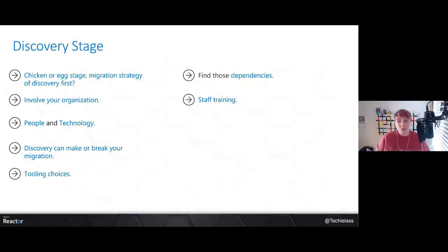You have to understand what's in your environment in order to do that strategy, because you could end up saying, I want to move everything as a PaaS solution and have serverless and not look after virtual machines. And then you find out halfway through your project that one of your services, one of your applications can't run serverless and needs to run on that operating system model as well. So you really have to do that deep dive discovery of understanding what's in your organisation and where the future of your organisation is going, so you can actually strategize.